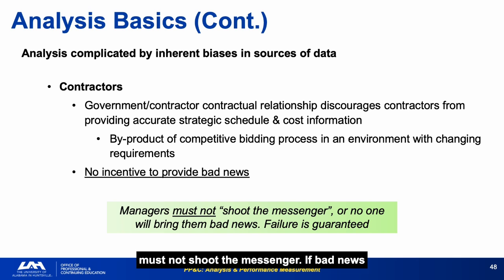Managers must not shoot the messenger. If bad news is punished, people stop bringing it, and failure is then guaranteed. Your job as the analyst is to find the bad news the contractor is not volunteering. That requires asking different questions, digging into lower WBS levels, and comparing actuals to what similar programs experienced at the same point.